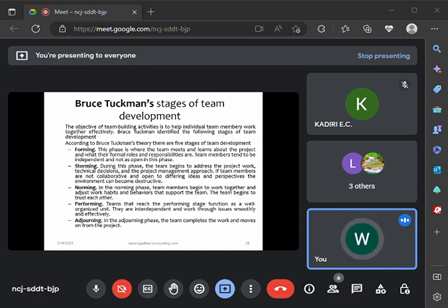So developing project team can be simply achieved with the concept of team building activities. Examples of those team building activities are taking training classes together as a team, attending milestone parties together as a team, even birthday and holiday party celebrations, going out for off-work trips together, creating the WBS together, and getting everyone involved in your planning. What are you doing? You are doing team building.